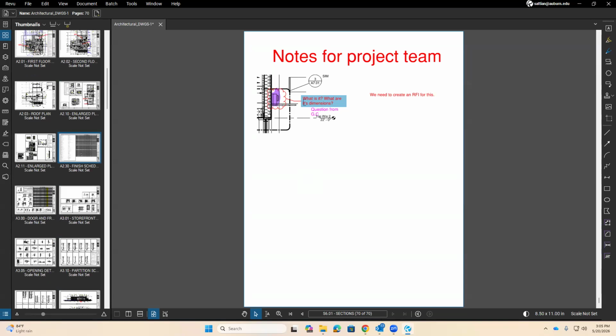In construction, there is a term that we use called punch list. Okay? Punch list is when, let's say you're the contractor, you're about finished with your project, right? Now, before you go to the owner and say, Mr. Owner, here are your keys, the owner will say, let's do a walkthrough. And the owner will come and say, that tile is dirty, that's kind of not cut correctly. Let's fix that. Okay? Well, in order for me to remember, I'll take a picture of it. And now I know what it looks like. So next time when I come back for the walkthrough, I better see that fixed.